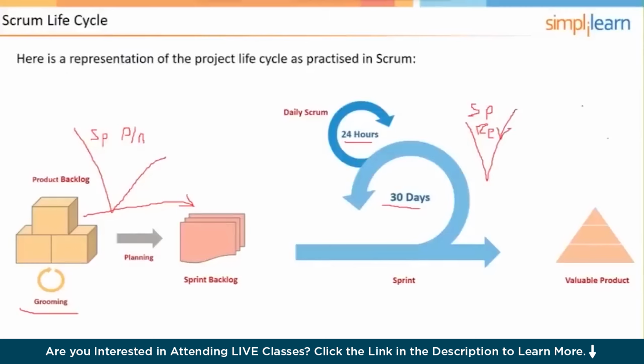So if we're doing a 4-week sprint, the sprint review meeting would be 4 hours in length. The primary purpose of the review is to showcase and demo the software and get feedback from relevant stakeholders and allow the product owner to say, I accept or I reject the work that has been done.